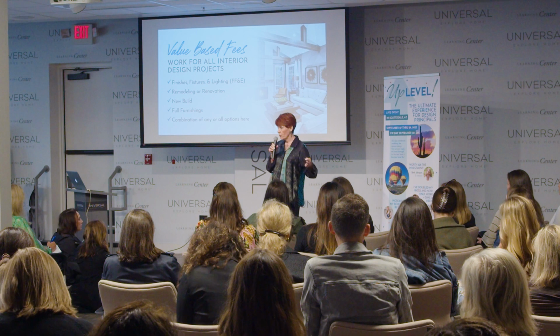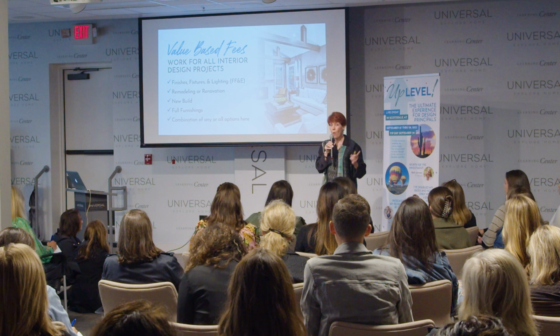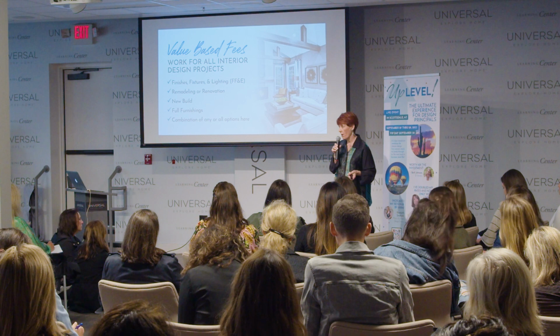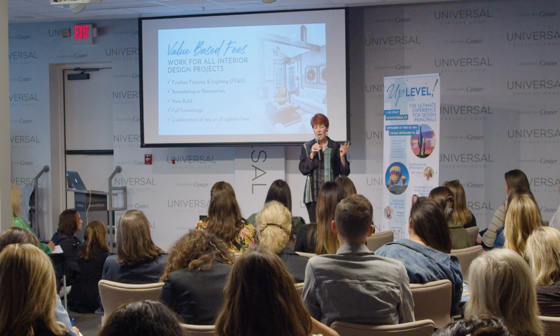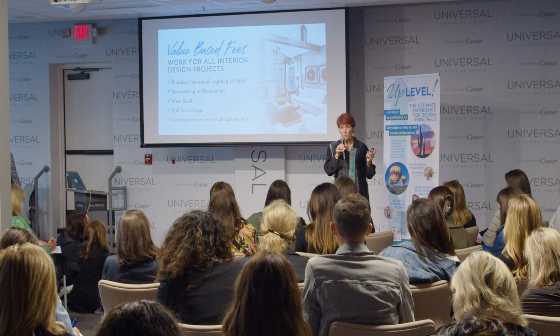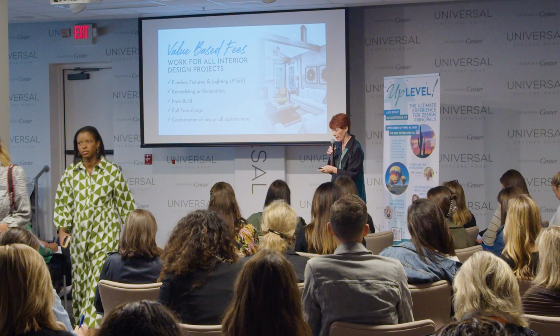Okay. So value-based fees work for everything. I get this question a lot. They work for finishes, fixtures, and lighting, remodeling or renovation, new build, full furnishings, a combination thereof. There's nothing they don't work for. When you move to flat and fixed fees, value-based fees, you must eliminate the mention or reference of hourly from your website, from your conversations, from your contracts. You cannot mix these. It will backfire very badly because they will try to do reverse math on you if they start hearing an hourly fee, and that can be a real problem.